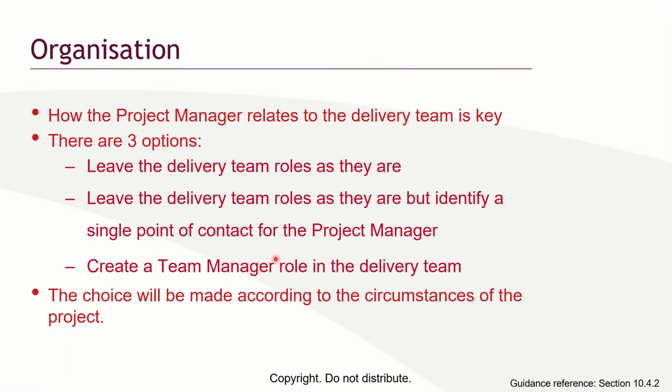The lead engineer relates with the Scrum Master and the product owner. But it also depends on the size of the project. In some organizations, the Scrum Master himself will be the lead engineer. That means he's actually taking part in the delivery of the project. But that should not be, because the job of a Scrum Master is not to carry out the work, it is to follow a plan, to check who is following the plan, what is the next plan, and what can hinder this project from taking place. It is not to get his hands dirty, for example, carrying the block, setting the block. No, that's not the job of a project owner or a Scrum Master.